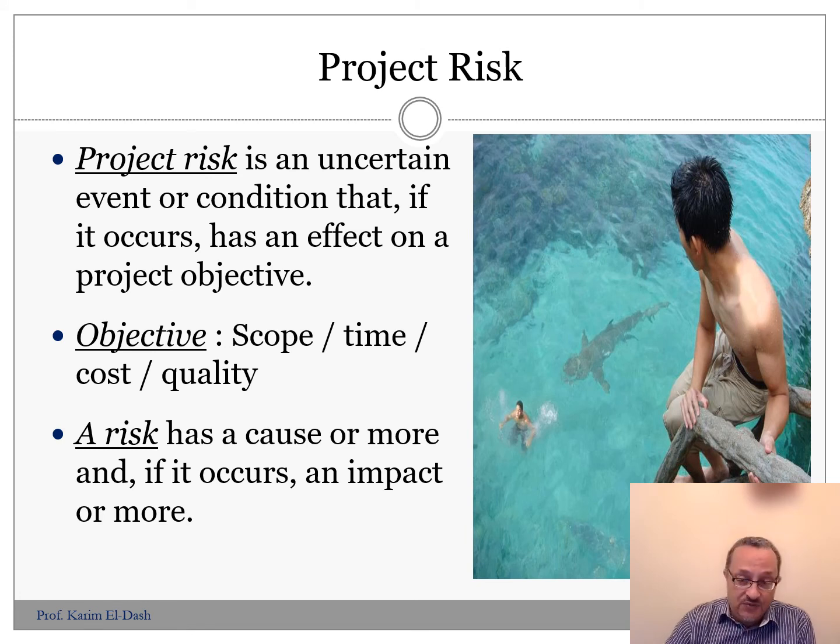If the delay is very severe, if we have too long a period of stoppage of the activities of the project, in this case, we might reduce the scope, especially if we're talking about something related to technology, not construction. In construction, changes are not as fast as for technological projects like IT projects and communication projects. If you have a delay with one of those projects, IT, communication, and similar fast developing technologies, you are in trouble. So you have to consider the scope as well.